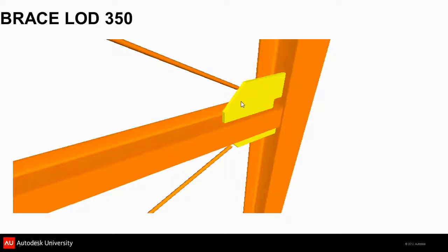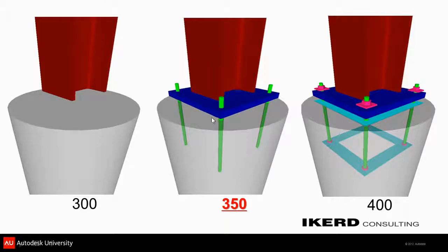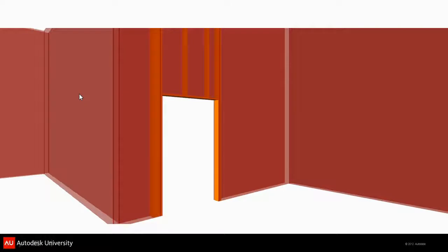So there's this intermediate step. So this would be another example. I've got images we'll show later of a roof drain riser coming down. I think the challenge there is you don't need to have fasteners, washers, and threads to start coordinating your drain riser drops. But you do need to have something more than just the early on 300 level column.